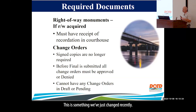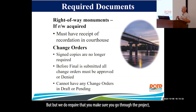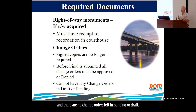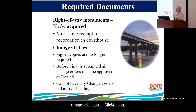Change orders — this is something we've just changed recently, brand new. Signed change orders are no longer needed, but we do require that you go through the project and make sure there are no change orders left in pending or draft. Make sure they're either approved or denied — they should say denied or approved on the change order report in Site Manager.